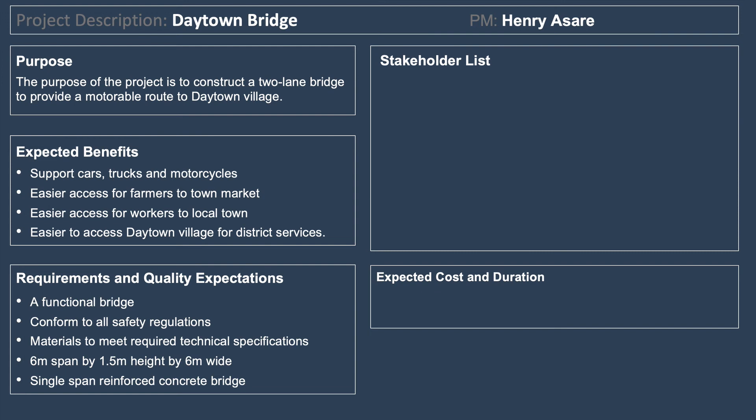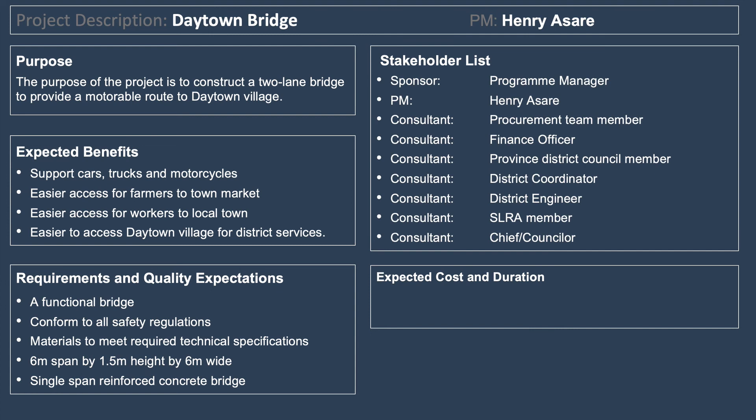The stakeholders the project manager identified include: the program manager from the local district, Henry as project manager, a procurement team member for purchasing and contracts, a financial officer to oversee budget spending, the province district council member, the district coordinator, the district engineer, an SLRA member, and the chief counselor to represent the local village.